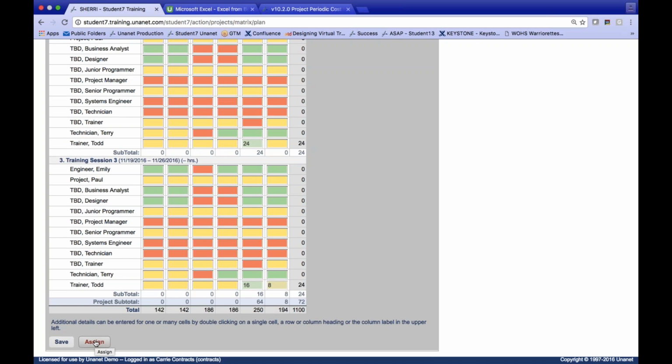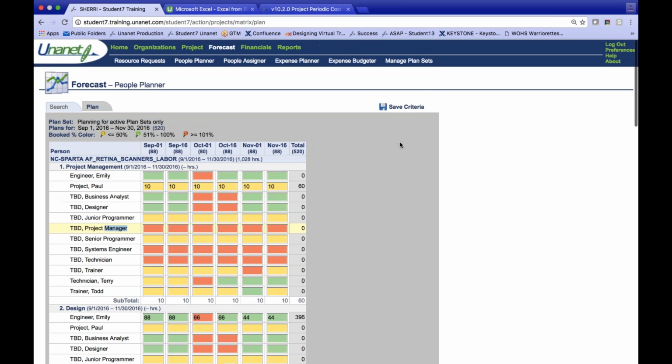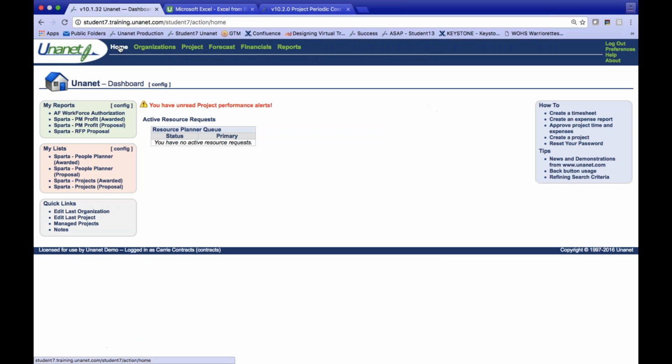All right. Then the great thing about that is once all this is in place, I can hit one button, and I'm automatically going to assign all of these people to start working. They're authorized to work on the contracts, on the projects, and start working. September 1, let's go for it. So I would hit the assign button, and it would create a budget or resource assignment of those plans and a copy, and it would authorize those people to start charging time in their timesheets.